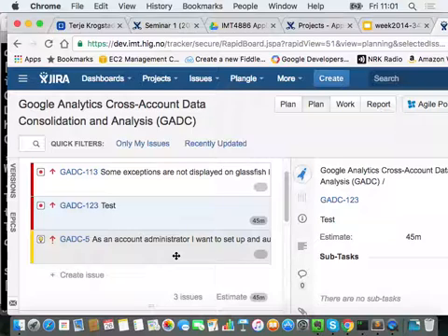That's not a type related to time. It's more a type related to an estimation of how much work you think it will be without knowing how much time you will use. So by using story points on a larger scale, maybe for a year or so, you know more or less how many story points the completion of a module will be at any time. So it's more free from time than time estimation is.